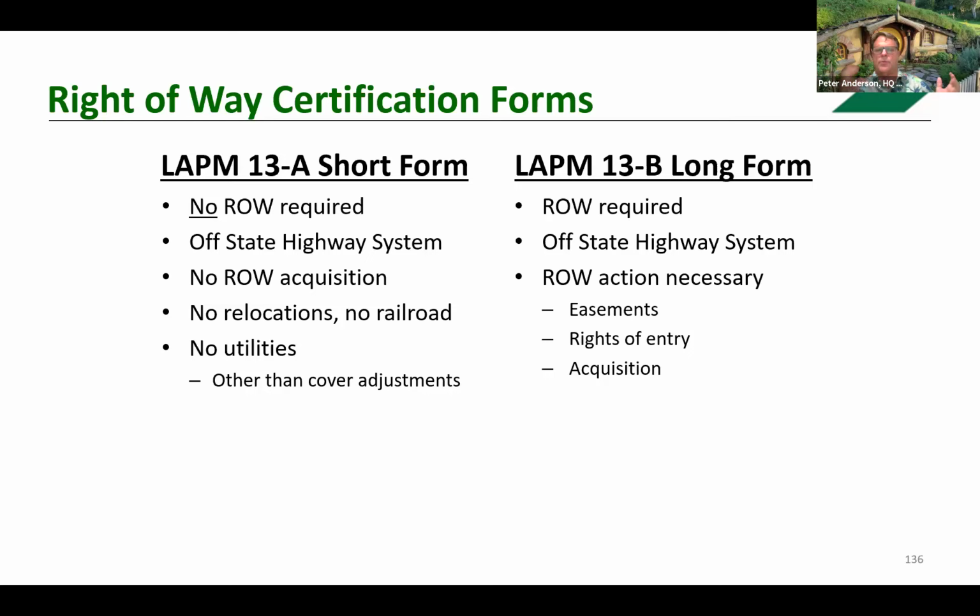Yeah, that's correct. So you think of phase as just like I said, one project. Yes, it's different components. A lot of times when you have those type of phase projects, there's actually a single environmental document that covers the entire project. It just goes to say, and then construction then is broken into multiple phases.